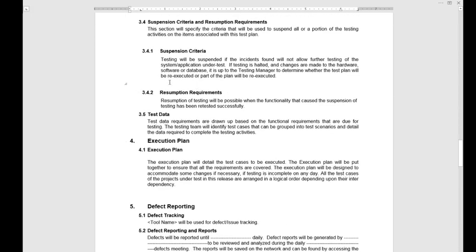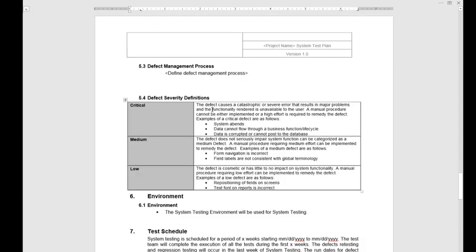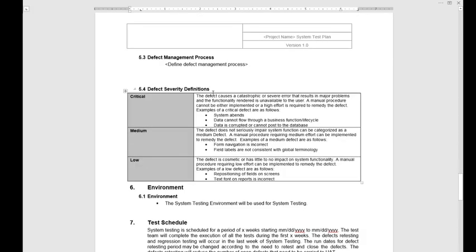So let's take a look at the test data. Data could be tested differently, and the functional specification can be tested differently. All different types of tests are done, and all of this information gets updated into this document, describing how we are going to do this. And defects: how we are going to define a defect. For example, if the application has an issue that is critical, medium or low, the priority can be defined out of the defects. And how defects are going to be managed. Is it going to be a defect management application, where if the tester has an issue with the test case, they will update this scenario into the test management application, and assign these defects?